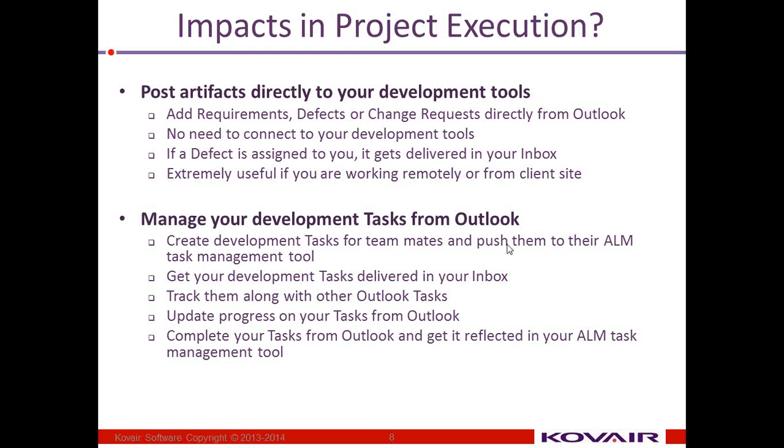Also, we should be able to update our progress directly from the Outlook task, and this update of progress, say I've done it 50%, should get automatically reflected in my project management tool or wherever I'm maintaining the schedule or tasks, for example MS Project, Microsoft Project. So if you mark a task as completed inside your Outlook, then it should get reflected in your MS Project or other project management tool that this job has got completed.